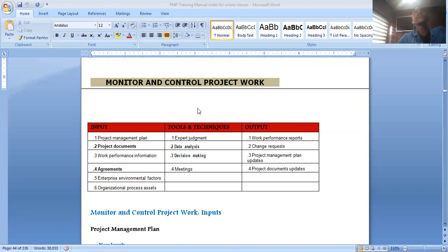When you say we are behind our schedule by 3 days, that is a progress report that you are passing on. We have done 50% of it. That is status reports. Where we are is status reports. After we have gone, or after we are behind, it's about the progress reports. All right? So status report is where we are, the milestone we are at. You're not saying we are doing well or we are not doing well. So you use this information, and remember, as the expert, as a project manager, you have to be analyzing the data.